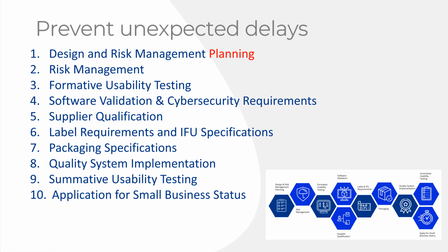These other documents are absolutely necessary. We have companies all the time that are doing electromedical devices, and they haven't worked on the risk management file. They don't realize that they're going to get an 80-something page document from the electrical safety lab asking them to please cross-reference where we can find the following information in your risk management file. And they don't even have a risk management file. They haven't even done any risk management activities. They don't have a risk management plan. And if you're trying to CE mark, you need a whole entire risk management file.